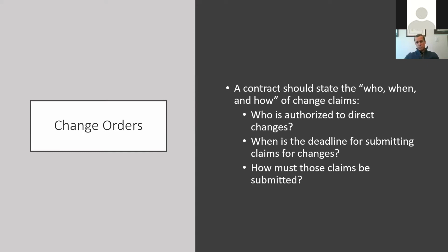On government projects where we're talking about potential change conditions that could be in the hundreds of thousands, maybe even the millions of dollars, the minutia that go into substantiating those claims is remarkable. You could fill a 4-inch binder for one claim. And for a smaller project, you just may have to back it up with the time and the material through timesheets and the material that you purchase from your supply house to perform that work. But it's important to understand, how is it going to be documented and how are you going to submit that?